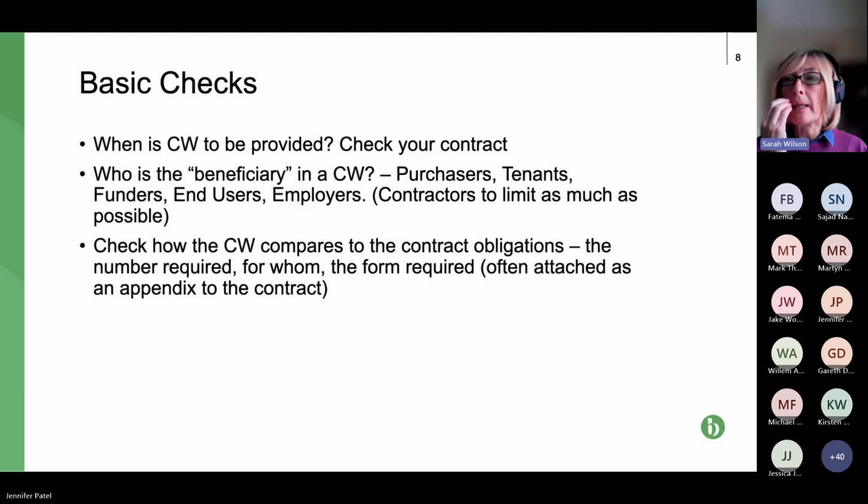So they've got the rights and obligations, but they would probably want collateral warranties from subcontractors and from consultants. The other thing, and again, things change over time. Probably about 10 years ago, collateral warranties were really focused on design. So where contractors, subcontractors, consultants had design responsibility, collateral warranties were a requirement. It's shifted slightly, probably since COVID, although I am sure it's nothing to do with COVID.